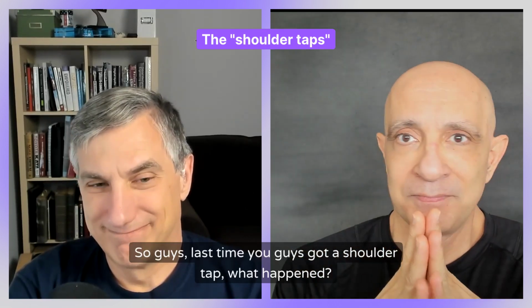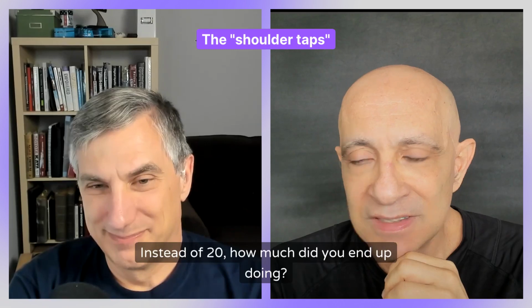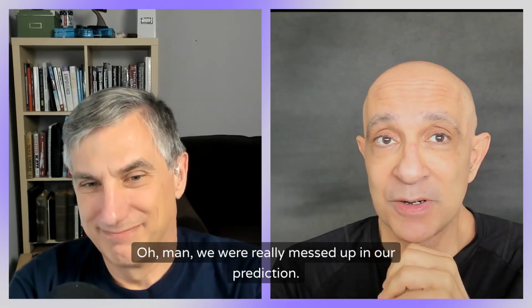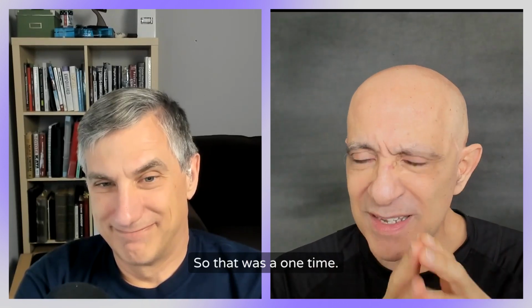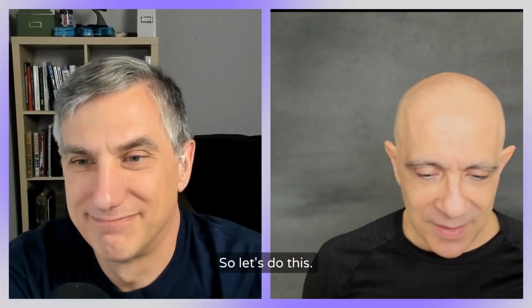So, guys, last time you got a shoulder tap, what happened? Instead of 20, how much did you end up doing? "Oh, man, we were really messed up in our predictions. So it was like 14." Okay. So you know that when things go bad, it's 14. Okay. So that was a one time. Yeah. So on average about 3. Okay, good.